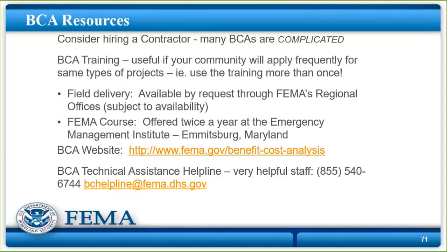I will tell you that for seismic retrofits, you have to use a consulting engineer, period, because the data fields that are required, only an engineer knows what they mean and understands them, and that engineer has to be the guy or gal that did the seismic vulnerability analysis of the structure because they have to know the details of the inside of that structure and how it was built before they can fill in the BCA module.